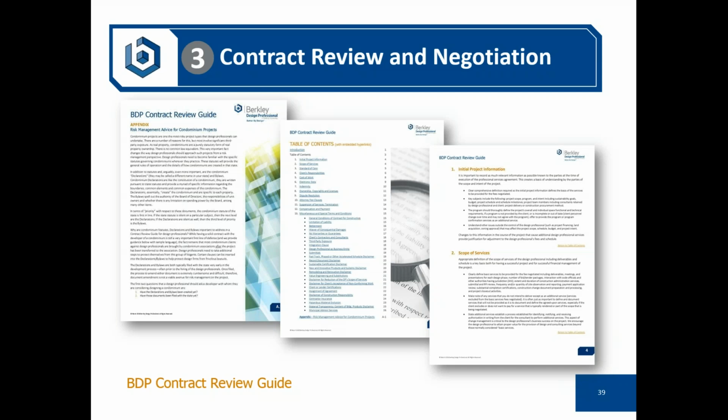Condominium projects are the riskiest projects that an architect or an engineer can take on. So there are special contract considerations for those types of projects, as well as a recommendation that you be particularly diligent in that client selection process for those types of projects because of issues that often occur post-construction.